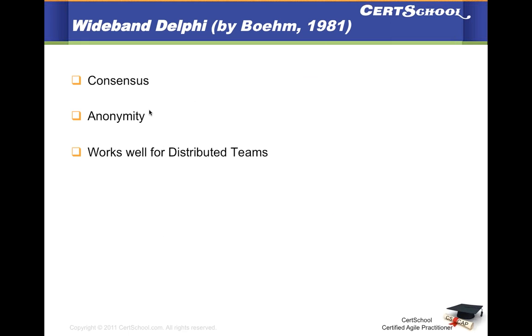However, that is changing very quickly because we have these planning poker cards available like virtual cards online, where you have a virtual deck of those cards, and you can play it synchronously if you're not all co-located. But for a distributed team where there is a huge time difference, it becomes difficult to play planning poker. So in that case, Wideband Delphi has proven very effective.